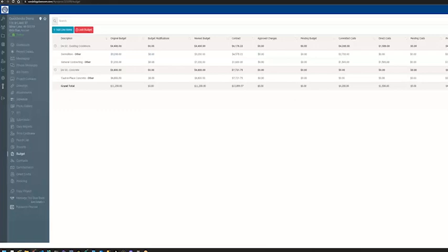And really the goal here is to make it an accurate depiction of what costs are on the project. So at the end of the project, your costs and your invoiced amounts and everything in this system will match QuickBooks one-to-one because we're synchronizing the costs back from QuickBooks. And of course, we're synchronizing the costs to QuickBooks too. So if I create a direct cost here, it's going to synchronize and create an expense in QuickBooks. If I create it in QuickBooks, it's going to synchronize and create a direct cost in our system.